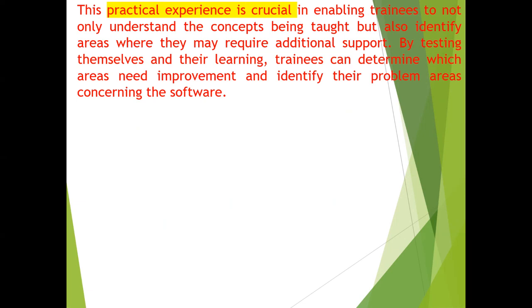So how do you take out all this information? Maybe in your program you have something called a lift installation. You want to give this work package to your lift subcontractor, so that he understands what you plan for this project: the material should come at this time, the installation will start at this time and complete at this time, with various activities. Then when the initial testing will be done, and when the final test. All this you want to extract from, let's say, 25,000 activities, in one simple click. For that, we have to do the coding. How you do the coding, that also we are going to learn.